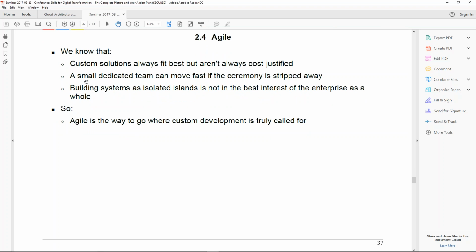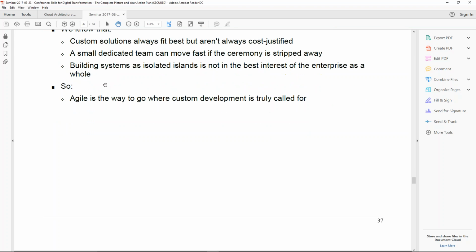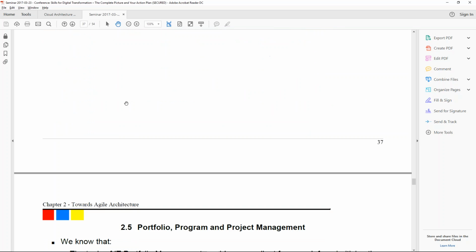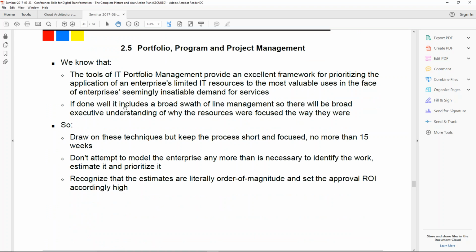If you look at product lifecycle, that shifts a little bit. Small teams build fast. If you're doing custom development, doing Agile for small projects is almost always a good idea. The larger a project is, the more you need management. The first of the Agile methods was Crystal, and Crystal basically says, look, different types of projects need different things. The bigger the project, the more you need coordination. The smaller the project, the less you need coordination.